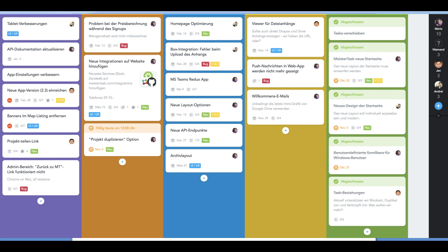Then friends, for sprint planning, tools are available that facilitate the estimation of user stories using techniques like story points, time estimates or planning poker, helping teams plan their capacity for upcoming sprints. So electronically, using the software, you can create the estimations as well.